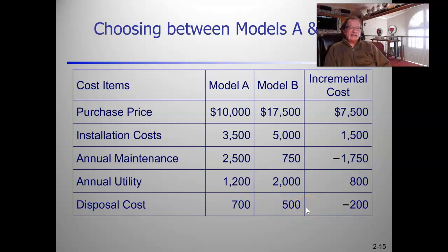Now recognize that this disposal cost is an estimate, and you're estimating what it's going to cost you when you're done utilizing the equipment. If you have a 10-year planned life, probably the most uncertain thing in your evaluation is going to be this disposal cost.